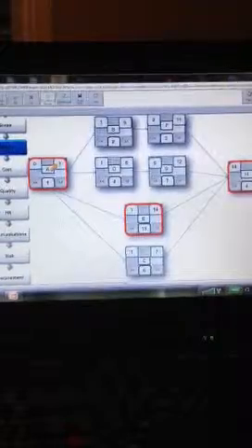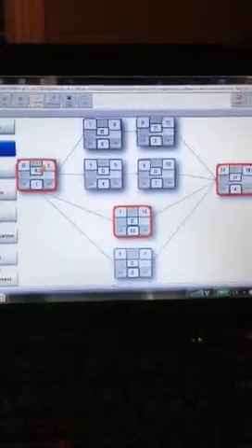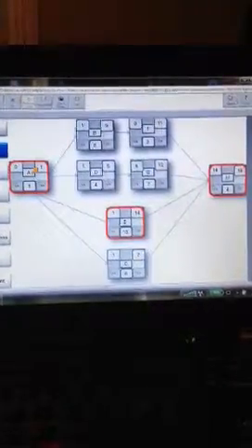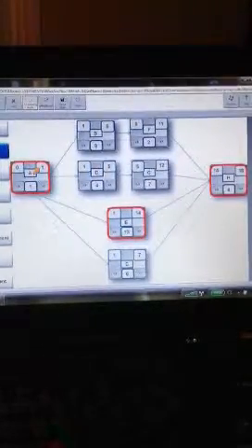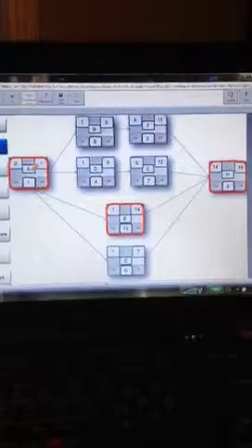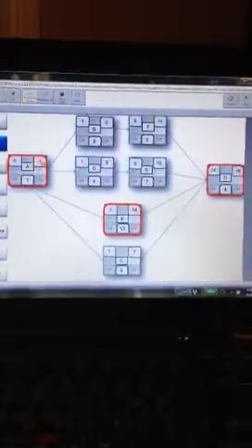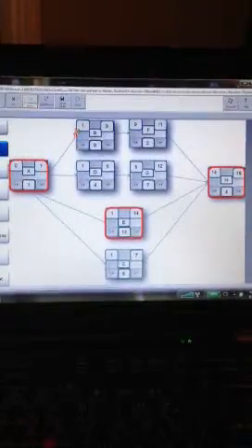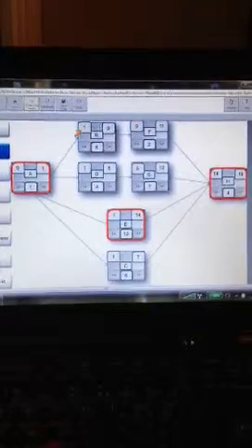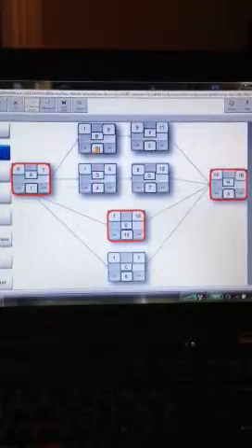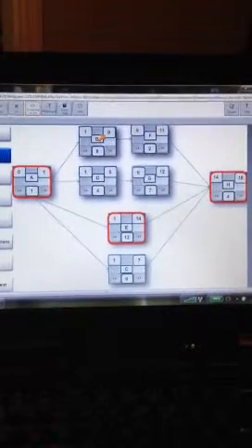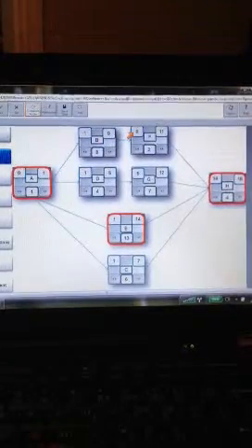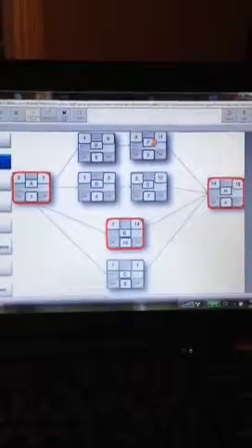Now, what makes this so difficult, and why I wanted to do this, is that there's definitely going to be a different strategy here than the one we covered in class. It was very straightforward. There wasn't any convergence at the end. So it makes it a bit difficult. Now, you carry that 1 up to B. That's the earliest that B can begin, plus its duration of 8, ends at 9. What's the earliest you can start at? 9 months, plus 2 gives you 11.